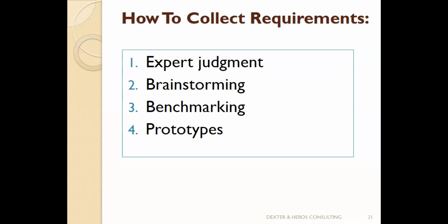Caveat, do not benchmark a product that is still within the patent period. Is that clear? You know what I mean by patent? Yes. A novel product, maybe you're the first person bringing it to earth, you probably will get a patent for it, meaning nobody can produce that thing for a certain period of time. You get it? So that's saying you cannot benchmark a product that is still within its patent period, to avoid legal matters.